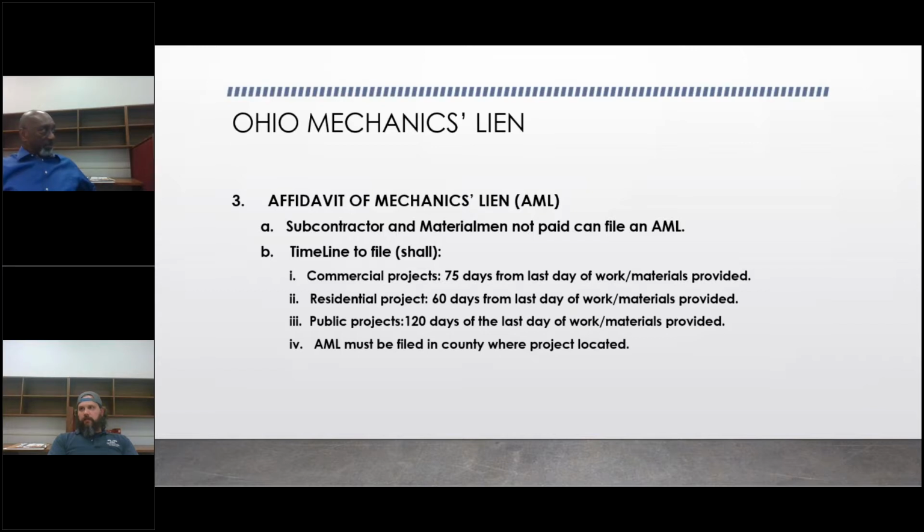I would say most of them, especially if it's anything larger where we're supplying a building or supplying anything major. I don't know if I could put an exact dollar amount to it, but I would say most projects, anything over like $10,000, a substantial project, we get into receiving notices of furnishing, and we're supplying notices of furnishing and receiving notices of commencement from the owners or the owner's agents. That's good. That's good management.